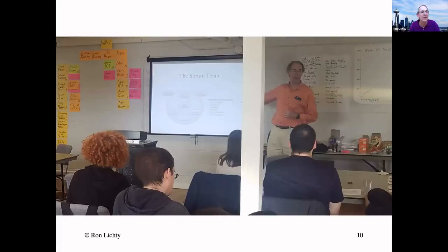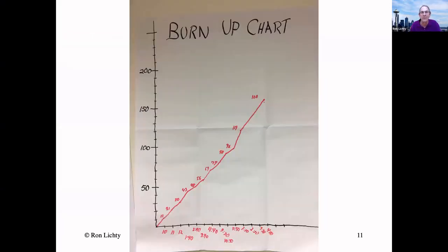And all the way to the left is a card wall. And on the card wall, you can see that we're partway through the class. There's a bunch of tickets, a bunch of learning stories under the done column. There's an epic and a story under the in progress column. WIP equals 1, and as you can see, we've got a backlog. This is a 2-day training. So this is what it looks like when you're in person. Here's a physical burn-up chart.